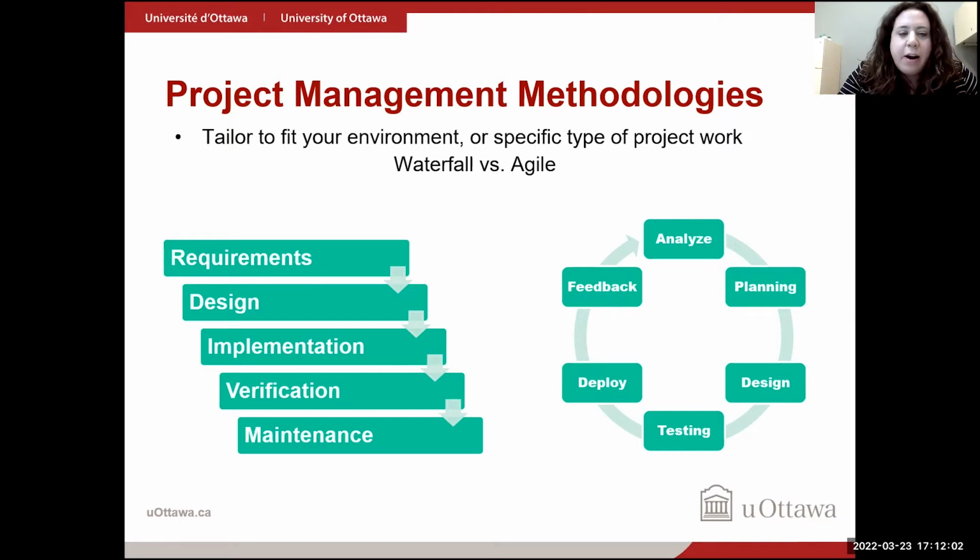Now, in an agile working environment, it's very collaborative and a fast, iterative approach where you analyze and test on a regular, most often 2-week sprint basis. But this fast iterative process, again, really involves your key stakeholders being quite hands-on. There's less focus on documentation in an agile approach, but you're delivering usable chunks of your end product faster. And so it's a nice way to approach technology projects.